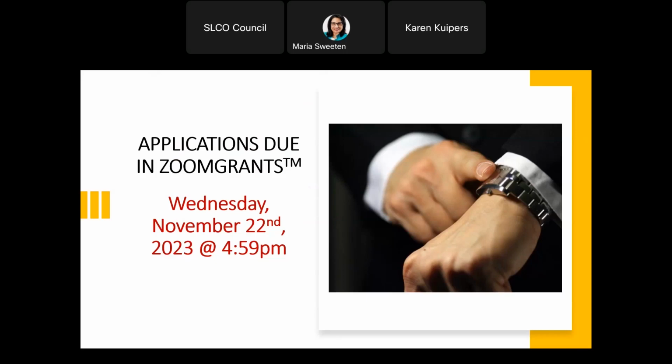Any questions? Like, in terms of the budget, when you're talking about committed funds, can you use in-kind donations of labor? Awesome question. So in that budget, you're typically not referring to the in-kind, but when you look at the budget, you're not seeing it on the hard cost, it's only on the soft cost. So yes, if you're budgeting that in, go ahead and put it in, and at the bottom, it says other, put in-kind. Let us see where that leveraging is. On soft cost applications, there's a place on the budget template where you can put in-kind donations.